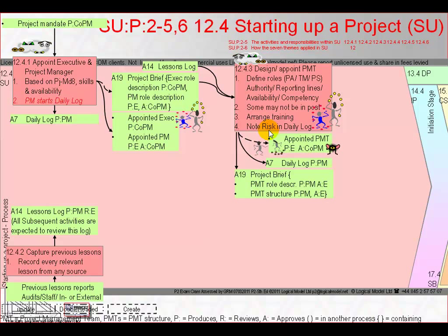We need to decide any appointment of people to project support as a role to assist the project manager, and also who will be team members and team managers, or perhaps we don't yet know enough to make those appointments. Consideration of who will be appointed to senior supplier and the team manager roles will almost certainly evolve as the project approach is decided and subcontractors are appointed.